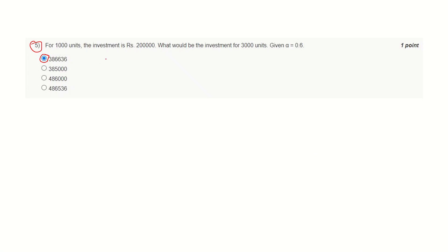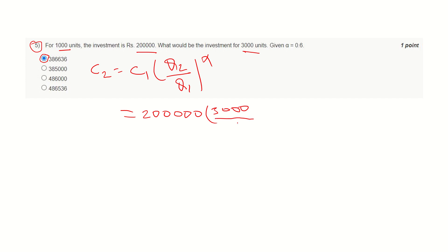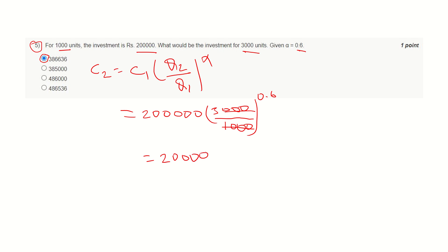Let's go to question number five. We are writing the expression: C2 equals C1 times (Q2 divided by Q1) raised to the power alpha. From the question, C1 is 2 lakhs, that is 250,000. Q2 is 3000 units and Q1 is 1000 units, that is 3000 divided by 1000. And alpha equals 0.6. So the simplified form will be 2 lakh times (3 raised to the power 0.6).